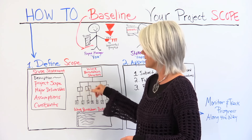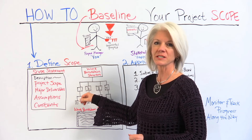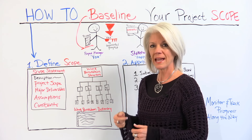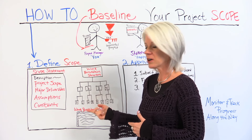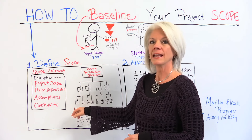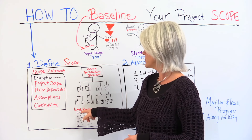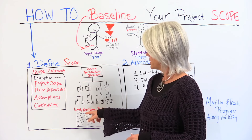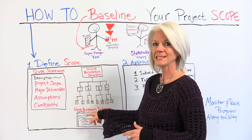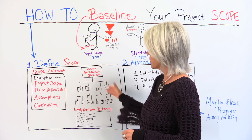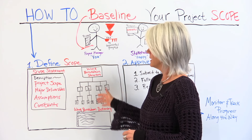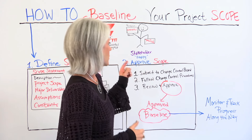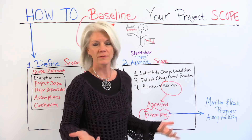Those detailed work packages are what we use to build the schedule and estimate the cost. We also use the work breakdown structure dictionary, which is a more detailed description of each of those work packages. So we define the scope and then we approve it.